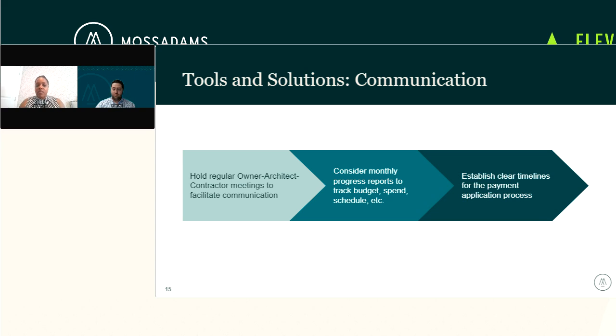So really critical is holding those OAC meetings, so owner, architect, contractor meetings, to facilitate that communication process. Typically, we see that done on a bi-weekly basis at a minimum, I would say, depending on the size of your project. And sometimes subcontractors are invited into those meetings as well if there's a critical issue that's plaguing the project.